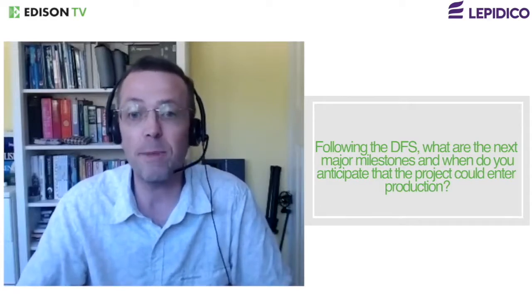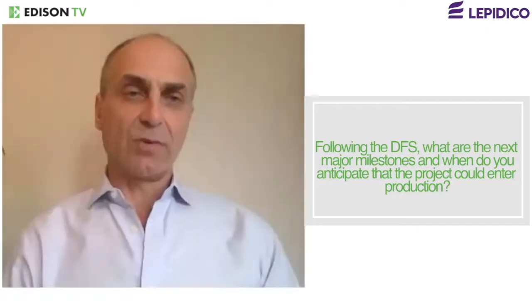Now looking forward, now that the DFS results are out, what are the next major milestones for you and for investors, and when do you anticipate that the project could actually enter production? So we've obviously achieved a major milestone with completion of the definitive feasibility study, and as the name suggests, it is a definitive body of work. We've already done some front-end engineering and design work, so we're well advanced on that. The critical path now is really pulling together that full funding package for the project, and binding offtake arrangements for our major products, the lithium, the caesium, the rubidium, and then getting our environmental and social impact assessments completed.